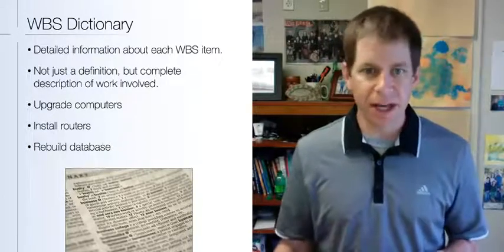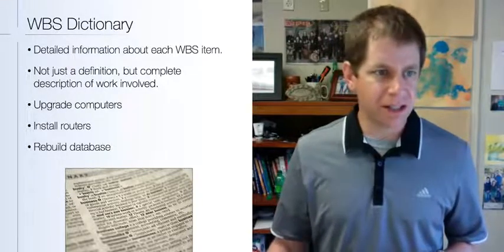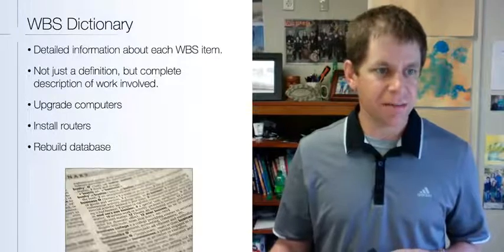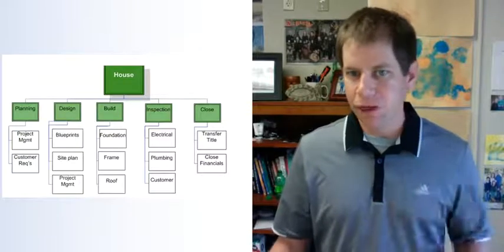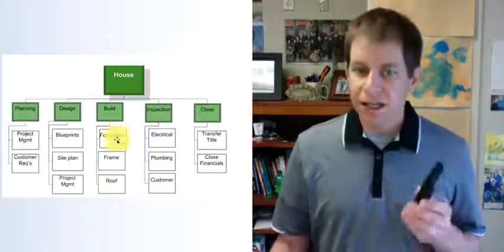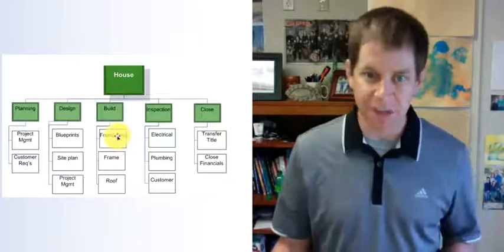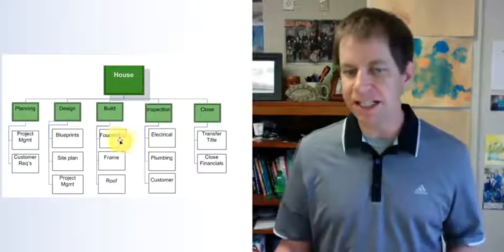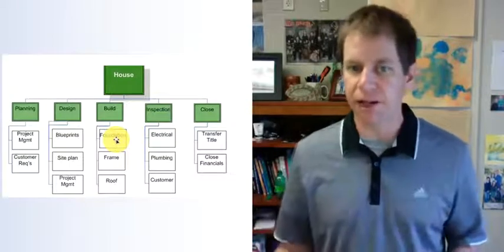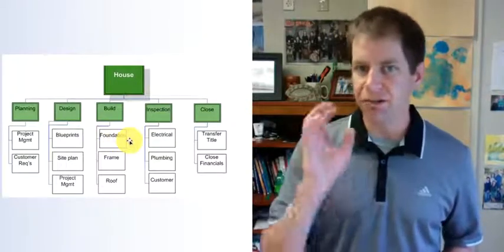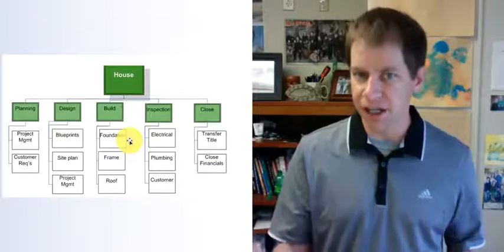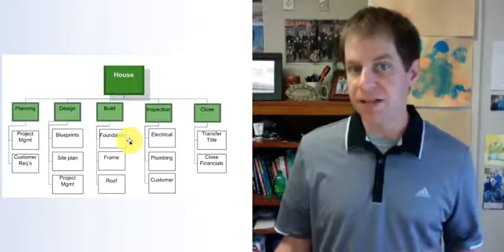structure item. So if we go back a little ways to the slide with the initial house construction work breakdown structure, each of these work packages, well, these here aren't even work packages because we would break them down even further, but when you get down to the granular level of having a work package that you can assign to a single point of contact to make sure it's done or not, those need to be defined.